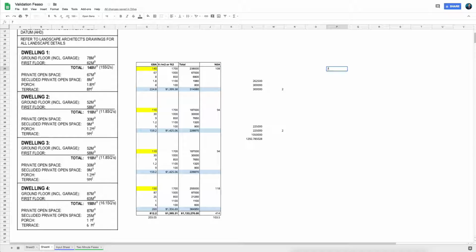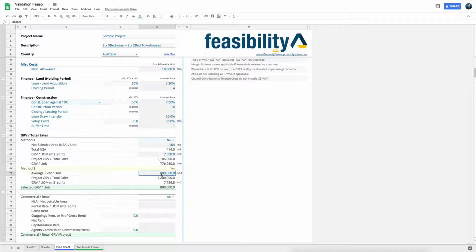Okay, you'll sell 2 units for 750,000. So let's put two units at 750,000, and then another two would go for maybe, let's say, 695. Then do an average of these, and you know that your average selling price would be 722,500. So over here I would come in and put 722,500 instead of that. So instantly you'll see that in this scenario I'm actually getting more, or in this scenario I'm getting less.